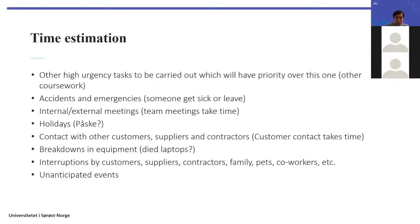When doing time estimation and calculating the critical path, you need to consider risk and buffer. There might be accidents, emergencies, or someone getting sick, which can impact the process. Meetings of all kinds take time. Spring break and other holidays should be taken into account. Contact with customers and other unanticipated events should also be considered — you will do risk management as part of your plan for calculating this.